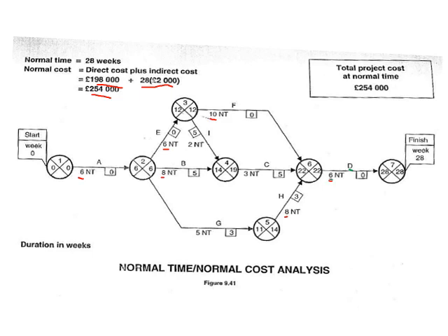That's 6 days. Then from here we can see that F is our next longest item, given at 10 days. Then working from there, it's 6, and then from there on it's A, which is our other 6 days. So it's 6 plus 6 is 12, plus 10 is 22, plus 6 is 28 days, which I calculated there.